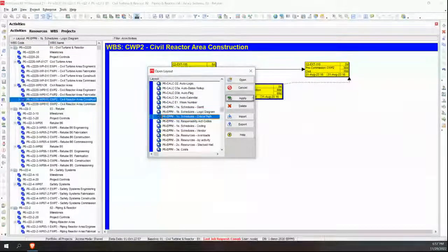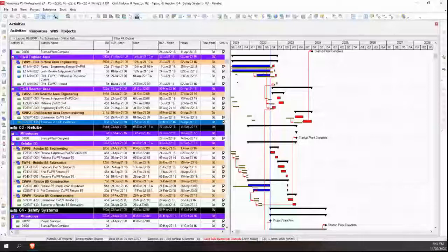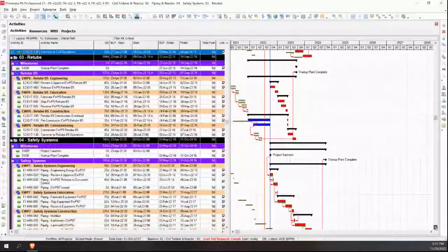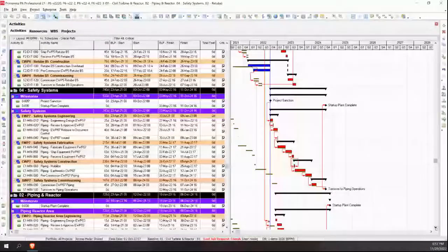Now, once you build all that, so you put your list of tasks in, your activities in, you develop your durations, you develop your logic, you should start to formulate these red lines, what you would call the critical path. Okay, now that's an important piece because that is showing you the work that is controlling how long the project is going to take.